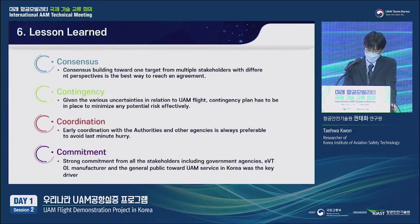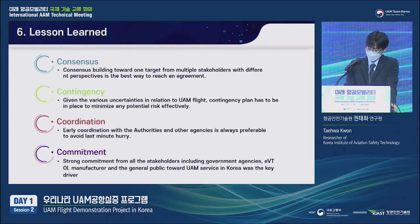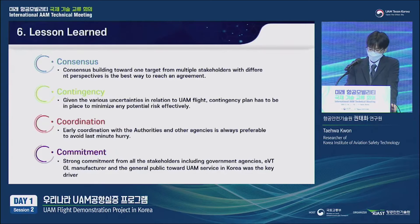Next, we came to understand once again that it is necessary to coordinate well in advance with not only the eVTOL manufacturer but also with authorities regarding permissions. And lastly, and most importantly, without strong commitment from all stakeholders — including government agencies, eVTOL manufacturers, and the general public — toward the introduction of UAM service in Korea, this project could not have been successful.